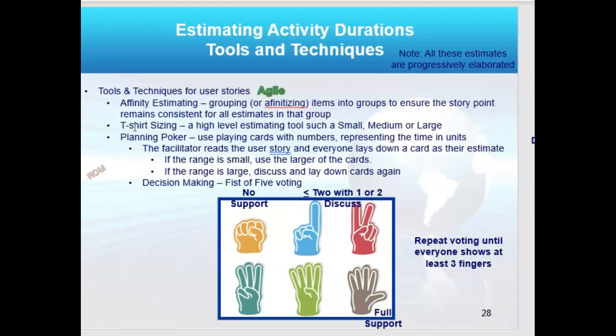That's how you can estimate the length of a story, just in those blocks. Or I could do planning poker, they call it, where everybody hears the story and they hold up their hand to determine their support or non-support of the numbers.